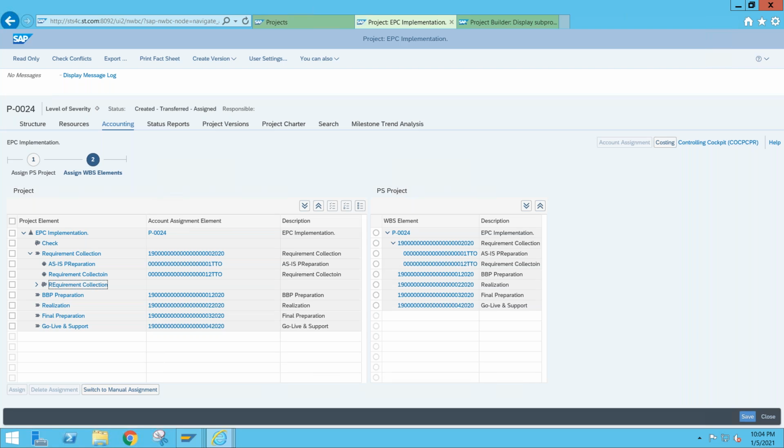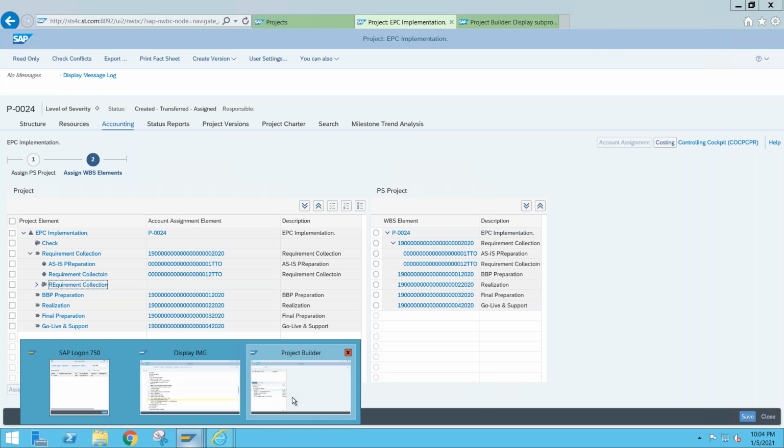So Rama, always a PPM definition will be a project definition also. Correct. Project system definition also. Correct. And other things like phases would be the WBS and sub WBS. Right. So phases will be WBS, second level WBS. Whatever the task you are creating with the phase, it will become a WBS. So let us see it in detail how it is reflecting.